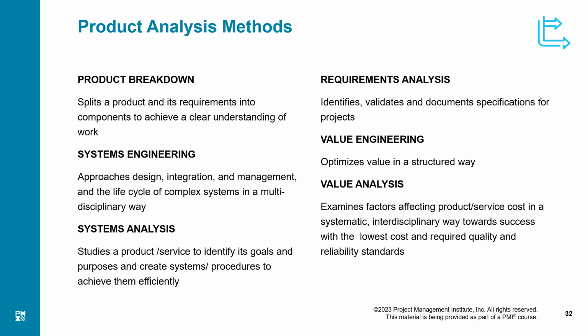that work package should be work. That should not be a piece of product. That is a condition imposed by PMI that we will call it a WBS. We will accommodate any method of breakdown, but the lowest level of the WBS, which is called the work package, will be a piece of work, not a deliverable. I hope you got the idea.